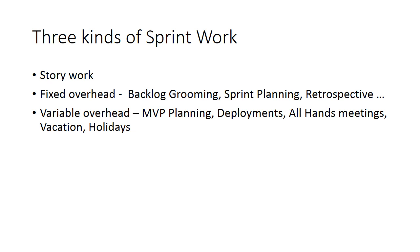There is also variable overhead, and this kind of overhead affects one sprint but may not affect others. Things like MVP planning, deployments, all-hands meetings, vacations, holidays — that's all variable overhead.